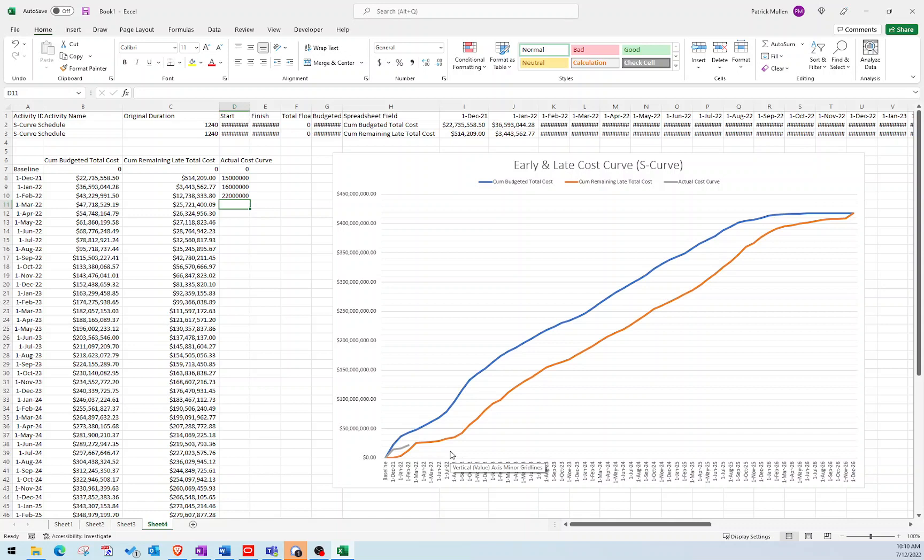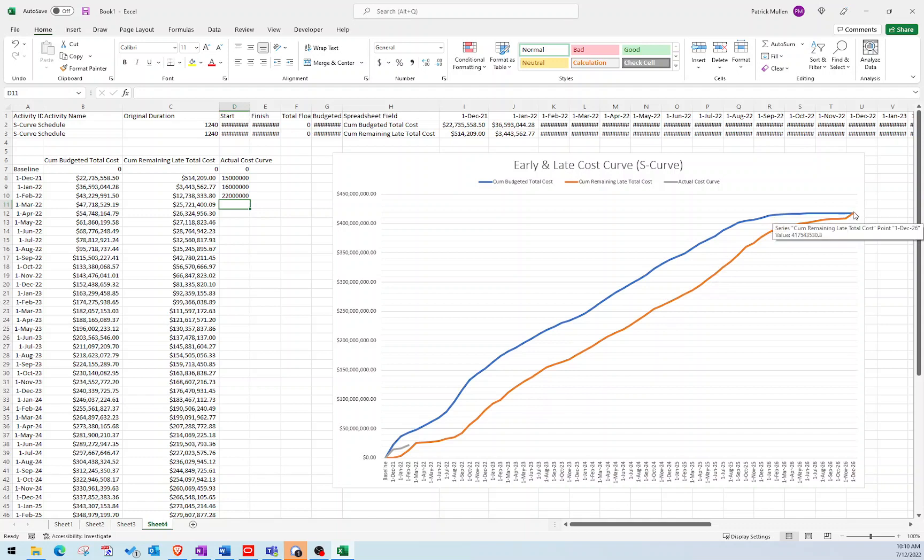But it doesn't necessarily mean that you will finish late. It just means you're going to have to catch up there at the end somehow if that's your plan. You're going to have to catch that cost up eventually if you're wanting to meet that completion date, which in our case is December of 2026.